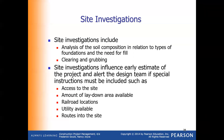Some of them are access to the site — do we have one access or multiple access? How does traffic flow within the job site when we have loading and unloading of materials? Also, the amount of lay-down area available on the job site — is it one, is it more for each trade, or do we have to rent lay-down areas? And then rural locations and utility availability, whether it's urban versus rural.